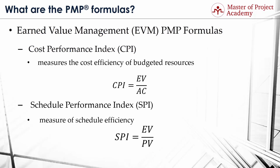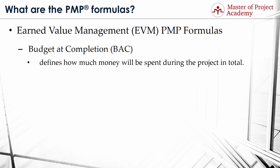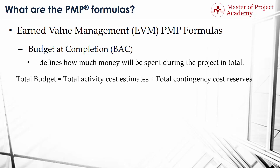PMP formula number 7: Budget at Completion or BAC. We determine BAC during the cost management activities, more specifically in the determine budget process of a project. BAC includes contingency reserves for activities and defines how much money will be spent during the project in total. Accordingly, its formula is: Total Budget equals total activity cost estimates plus total contingency cost reserves.